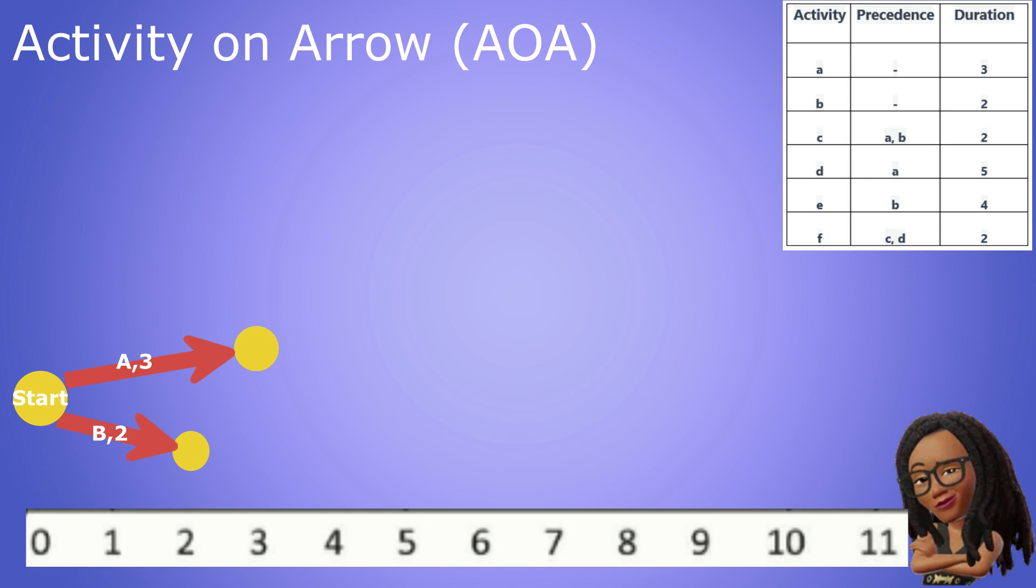We know activity C relies on both A and B to be finished before it can start. Even though B ends at day two, activity C still has to wait until day three when activity A is finished before it can start. With that knowledge we draw an arrow from A's terminating node to represent activity C. C has a duration of two days so we represent that on the timeline by terminating the arrow at day five.